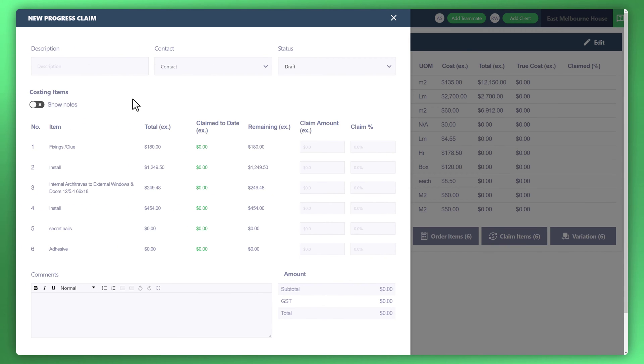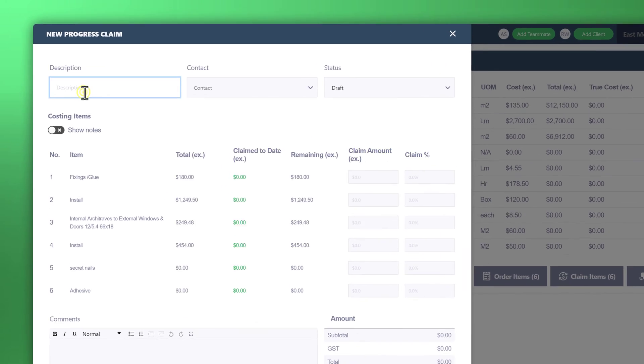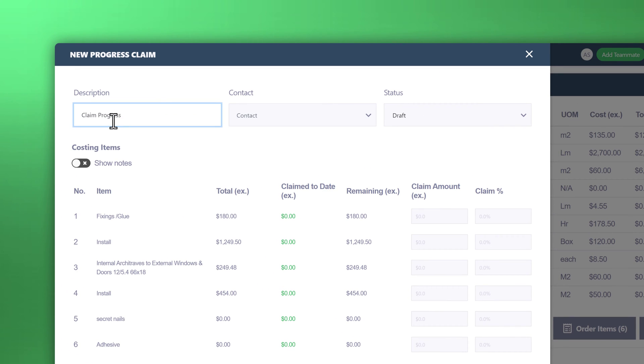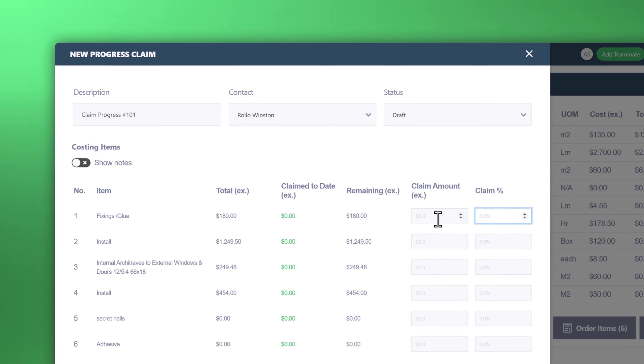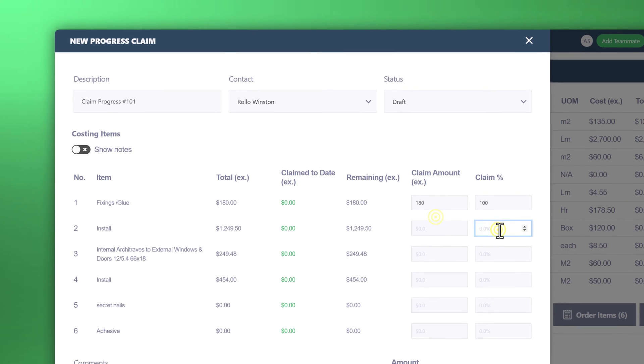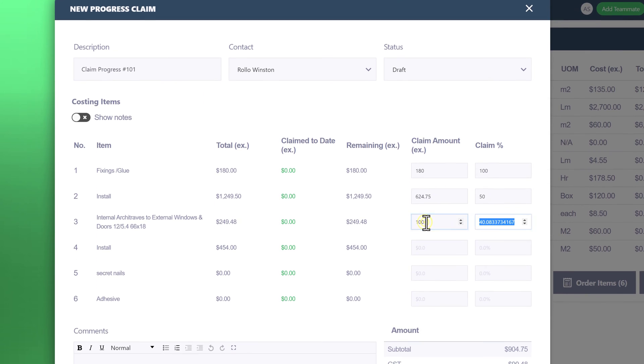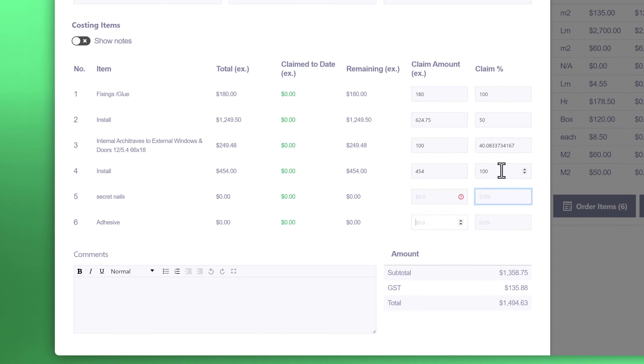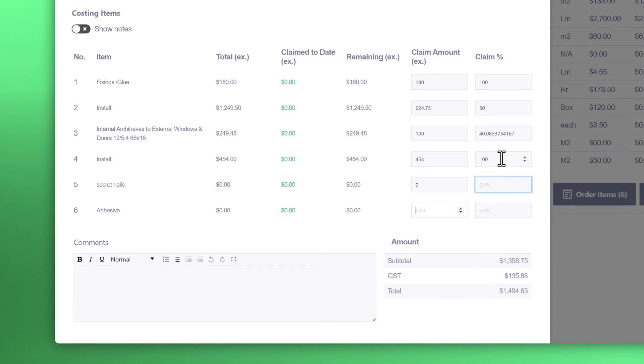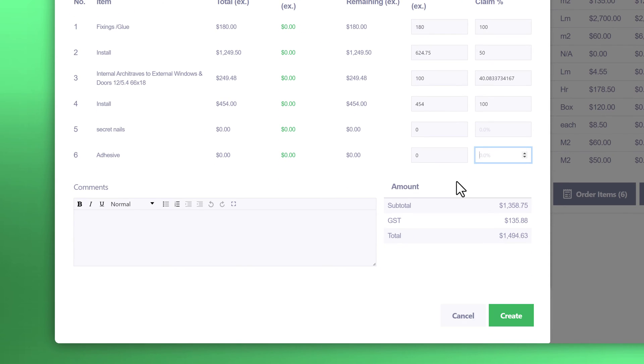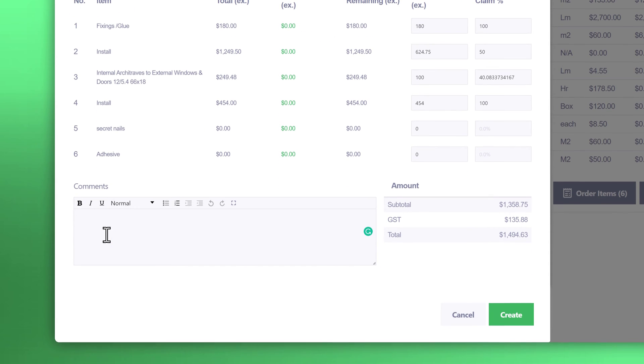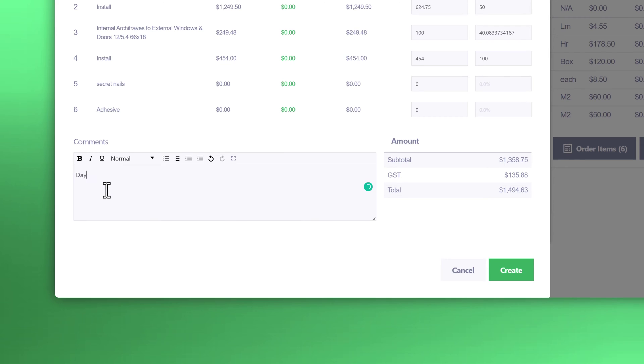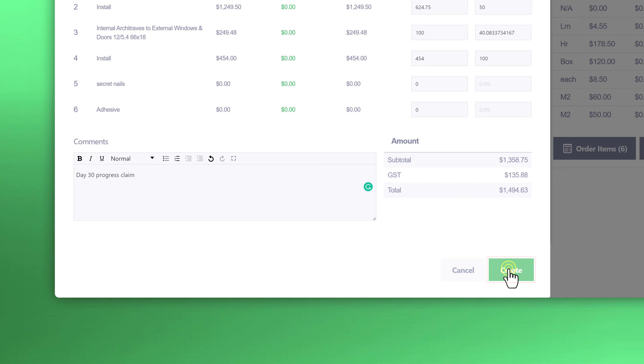Now you can see this form to be filled out which is the invoice that will be sent to your customer. All you need to do is create a description, pick the contact. Next to the category items that will be invoiced to the customer, you can start to enter the claim percentage that you'd like to claim, whether it be 100%, 50%, or a partial dollar amount. Send a message or comment that will appear on the customer's invoice. Once you're satisfied with the above, click the create button.